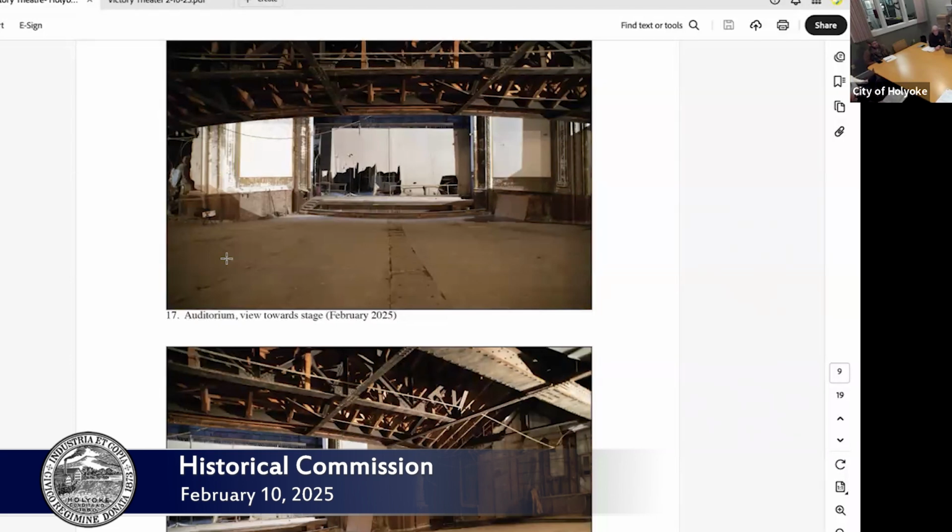And then we had a pre-meeting with the planning department where we introduced the idea, which was basically people hearing it informationally. The real issue at that meeting, at the beginning of December, was the fire department saying, we like this idea, we get it, but we must have an access point for fire prevention. We felt that was absolutely the first thing to be addressed, because that's a real issue in terms of safety of people. So the architects and the contractors went away. We have those plans. We can show you an example of them. And they came up with 3 solutions.